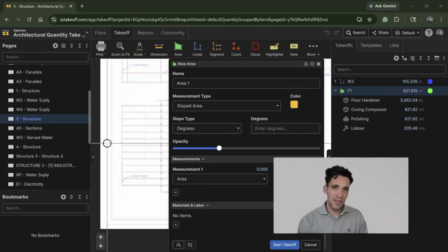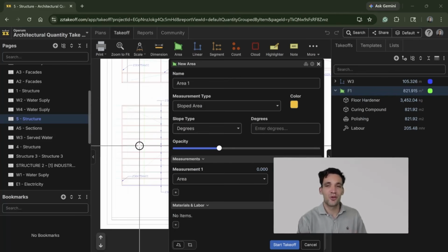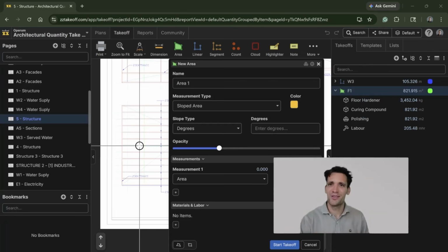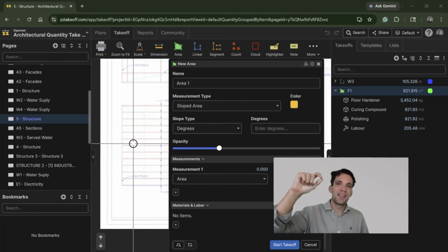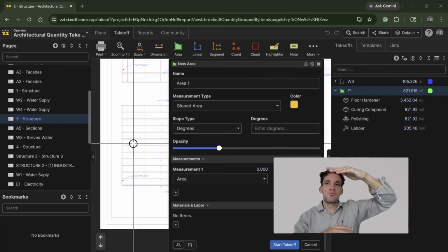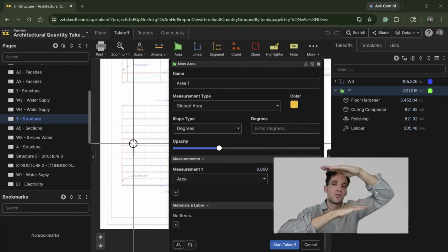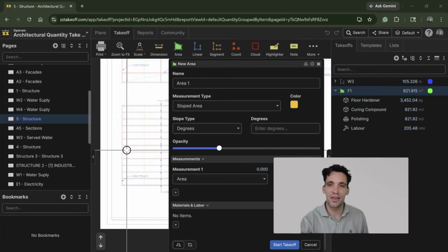If you're trying to do this in something like Bluebeam, you can do it, but you just have to apply a little trigonometry. You'll use the height and the width, and then using Pythagoras' theorem, if I can remember my year 8 maths, you measure the plan view, and then multiply it by the ratio of the angle to the plan view, which you would get using Pythagoras' theorem.